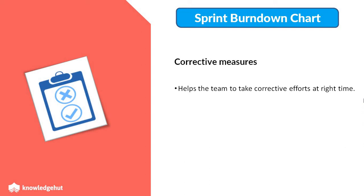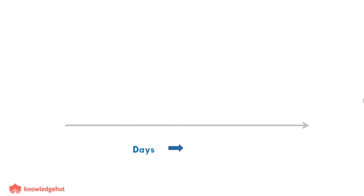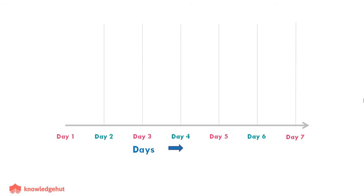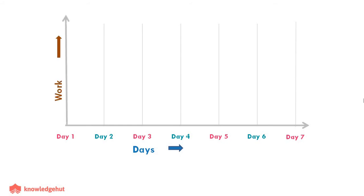Now let us have a look at the Sprint Burn Down Chart itself. The x-axis on the chart represents the number of days in the sprint. Suppose the target to finish the work is 7 days, then all 7 days will be plotted individually on the x-axis. The y-axis on the chart represents work, which is generally represented as story points. Story points are nothing but the estimate of efforts required to complete the task.